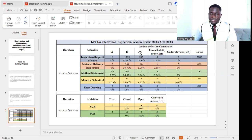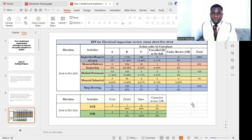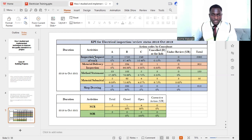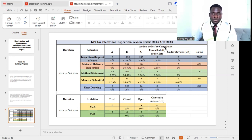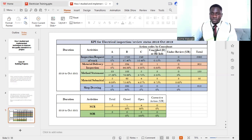The inputs were gathered on electrical installation works — I'm an electrical engineer by profession. As you can see, we have duration, activities, and a series of action codes by consultants. These are appraisals coming from the consultant after submitting an inspection, whether it's an inspection of work, material delivery inspection, or material inspection request. Codes can be A, B, or C. Cancelled inspections are marked as D for information. We also have under review and totals.